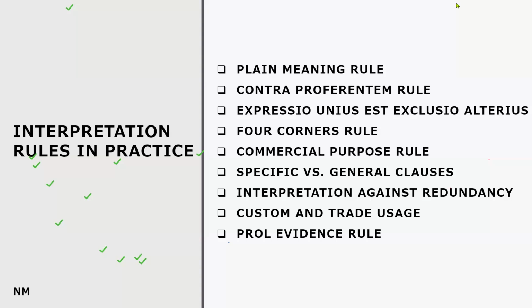Where certain terms are mentioned and certain terms are not mentioned, the omitted items are intentionally eliminated. So in that case, if we apply this rule to interpreting the situation with 2.1 and 4.12, the contractor is not entitled to the profit under 4.12. That kind of application you can use from this interpretation rule.